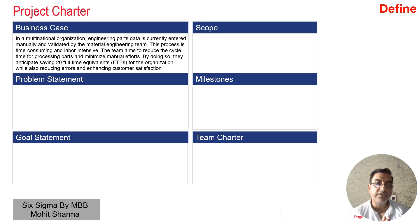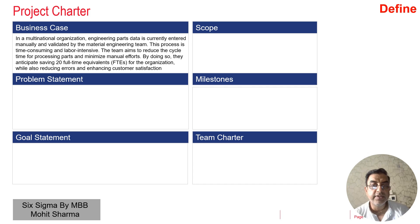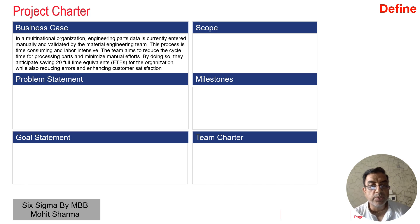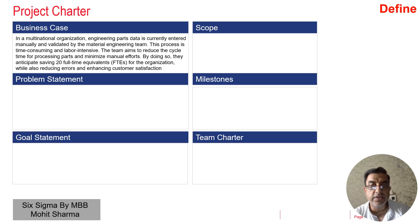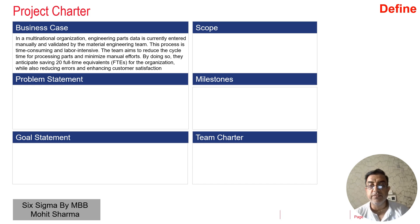In a multinational organization, engineering part data is currently entered manually and is validated by the material engineering team. This process is time consuming and labor intensive. The team aims to reduce the cycle time of processing parts and minimize manual efforts. By doing so they are anticipating a saving of 20 full-time equivalent employees for the organization, and they are also trying to reduce overall errors from manual work, which will enhance customer satisfaction.